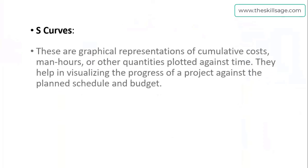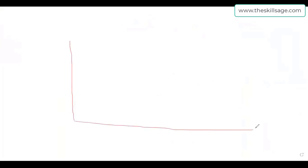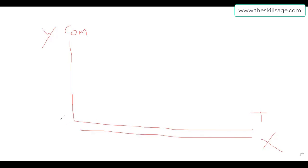The second most important thing is S curves. Whenever we are going to represent our project progress, there are graphical representations of cumulative cost, man hours, or other quantities plotted against time. They help in visualizing the progress of a project. Here you can see the Y-axis and the X-axis on the whiteboard. These are cumulative values, and time intervals like months, weeks, or years come on this axis, whereas cost, progress, or anything else we want to relate to monitor progress comes along the Y-axis.